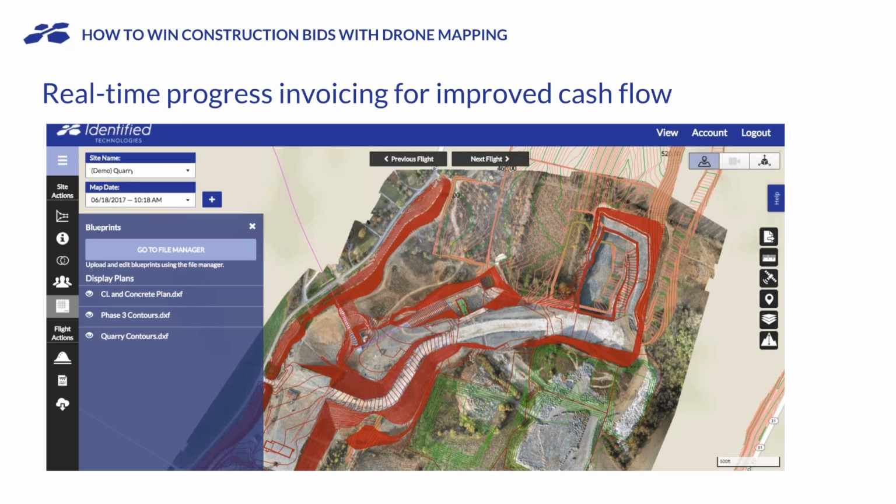I know one thing our customers have mentioned is they're basically halfway through the project. They're popping champagne, they're celebrating because it's going so well, they're so profitable, but they just don't have an accurate measure of how far they've progressed. And then at the end, they end up losing money on it, just because they didn't realize how much they had left to go. So this gives you that real picture.